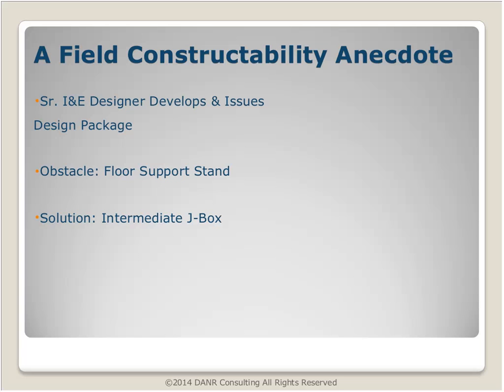But what he didn't do was a field constructability walkthrough with our field construction manager ahead of issuing the package. This designer had 30 years of experience, and he felt he had covered everything, and I had confidence in him. But when we got to the construction phase, our construction manager called me and asked me to come to the rack room, and he proceeded to point out that one of the cables from the field was 1 foot short for the cabinet that it was designated for.